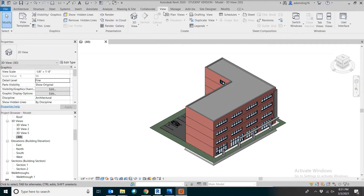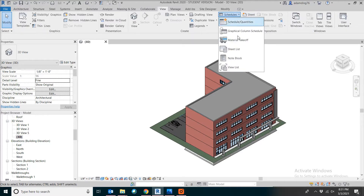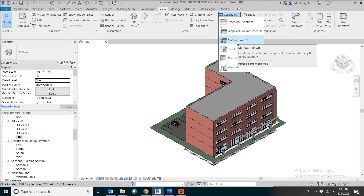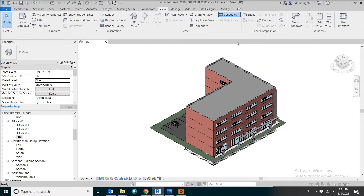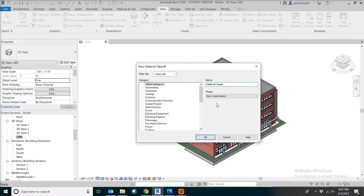Go to the View menu, then Schedules, then pick Material Takeoff. Let's keep it as the Multicategory Material Takeoff, but you can change the name to Material Scope. Click OK.